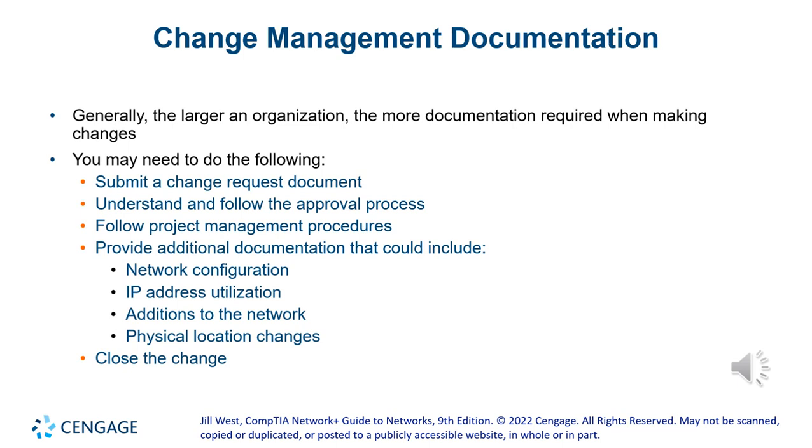The procedure changes depending on your organization and how things are organized in your company, but for the most part, you submit a change request. Then you follow the approval process. It might go to project management to see if you require multiple areas to be involved. I told you that when the website went down at the beginning of classes, we were 13 people connected on the call, and there were at least 5 different areas represented in that call, and we were all doing or checking something that pertained to our area, so we could all work together.